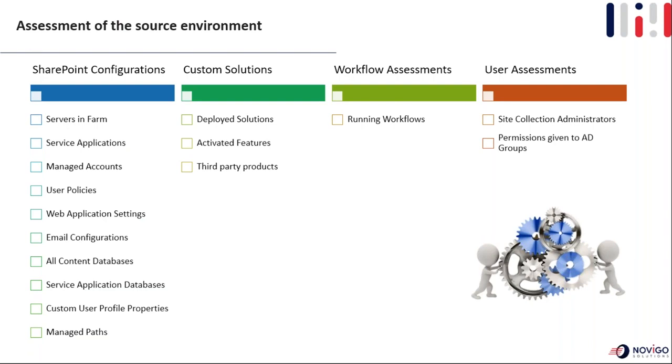The workflow assessment would include the running workflows and the tasks assigned to the people, because there is a possibility that after the database is migrated to the target environment, the workflow would not proceed, and you may have to restart the workflow. So most of the time it is recommended that you complete all the workflows before you start the migration, but in practical scenarios, it doesn't work out that way. Users will never be able to approve or close all the running workflows. So when we migrate to the target environment, we may have to restart all the workflows